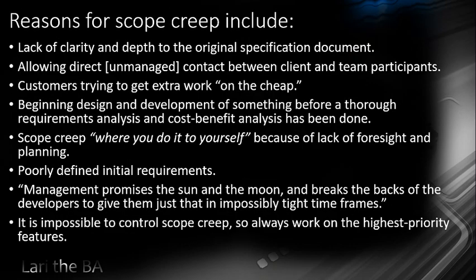So, what are the reasons for scope creep? They could be lack of clarity and depth in the original specification document. It could be allowing direct, unmanaged contact between client and team participants. Or they could also be customers trying to get extra work on the cheap. Beginning design and development of something before a thorough requirements analysis and cost benefit analysis has been done. Scope creep where you do it yourself because of lack of foresight and planning.